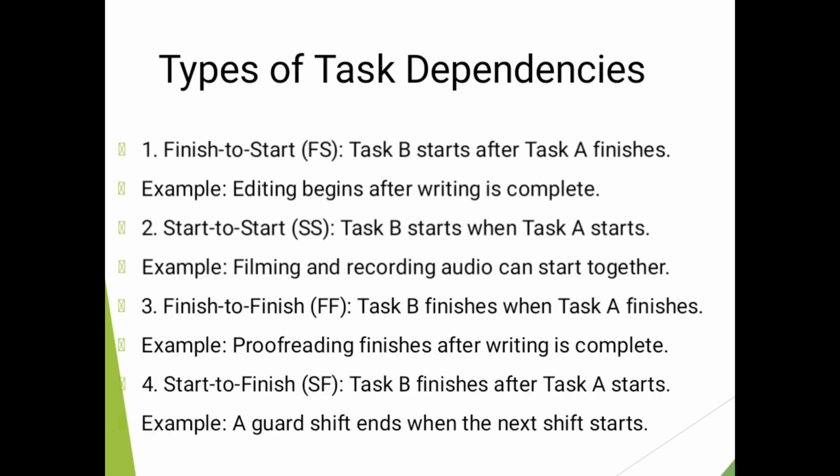Another one is start to finish. On this one, task B finishes after task A starts. An example on that one is a guard's shift ending when the next shift starts. Let's say a guard was on a night shift. For the shift of that particular guard to end, it is when the shift of another guard starts. So that is what we need to understand.